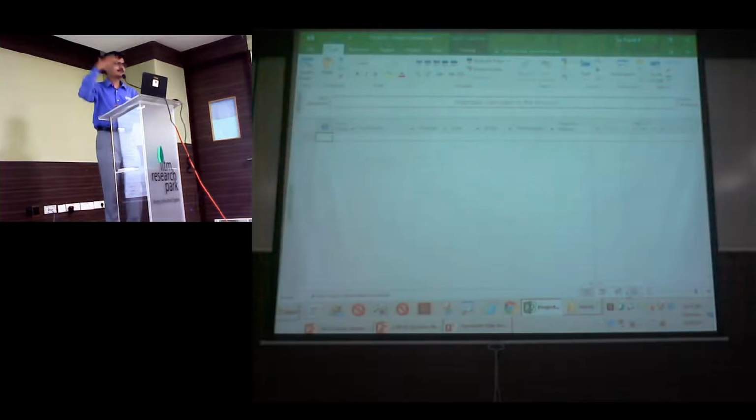Maybe later you might want to do rolling wave planning or progressive elaboration in order to decompose the work and start creating a detailed plan. So in order to do that, from Project 2010, this task mode feature has been introduced. So I'm going to create a very simple plan so that you are able to understand how the behavior is if I go for a task mode called manual, and how the behavior is if I go for an auto task mode.